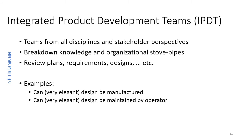Also important for planning is the integrated product development team. This is the idea of getting people from all phases of the life cycle and all elements of the system together to share their perspectives on how things can best be planned to maximize project execution. For example, manufacturing staff come in to think through how plans will give them the best opportunity to set up production lines efficiently. The same is true for operators and maintenance people — getting them involved early ensures the product is designed and developed consistently with their responsibilities.